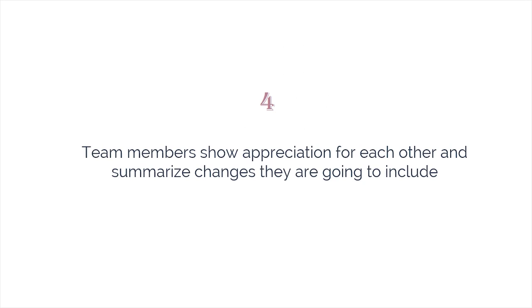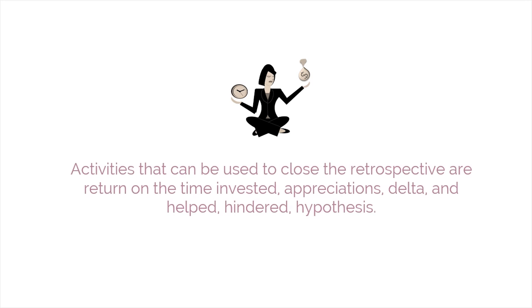In the final segment, team members show appreciation for each other and summarize the changes they are going to include going forward. Activities that can be used to close the retrospective are return on the time invested, appreciations, delta, and helped hindered hypotheses.